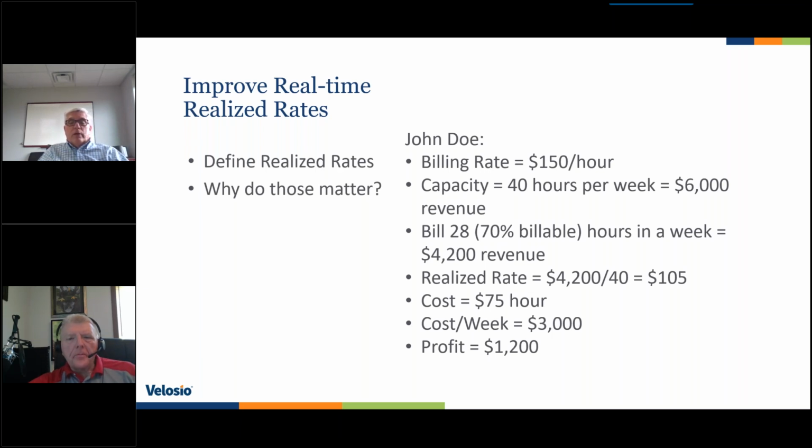So during that week, that resource costs us $3,000. Now, the other thing to consider on this, and we did this in a very simple math situation, the true cost of a resource could be more than that, depending on whether we're picking just their salary or their hourly rate, or if we're building in loaded costs with their benefits as well. So all things to think about.